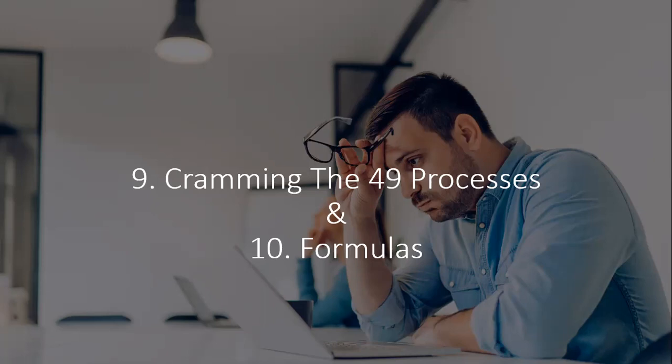As for the schedule variance and cost variance, if it's less than 0, bad. In other words, negative, bad. If it's positive, good. And that's the summary. That's the most you need to know for formulas. So cramming formulas and going crazy over them, not a good idea. The other thing that is related to formulas that you should know, just in case you get questions, as some students do, is the concept of earned value graphs. Other than that, every other formula, I would leave alone.